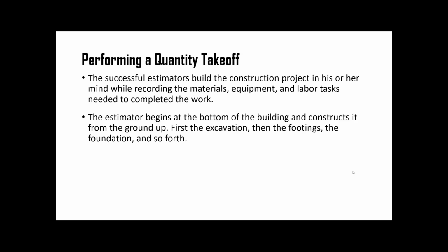The estimator normally begins at the bottom of the building and constructs it from the ground up. Like first they start with the excavation, then the footings, the foundation, and so forth, so that the building can be virtually created in their mind.